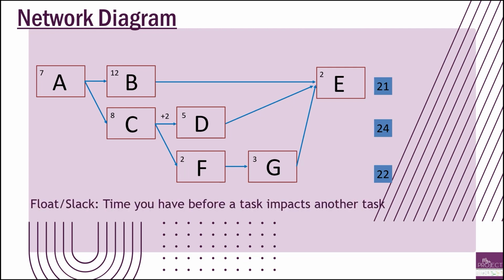This is also a calculation that you will do. And the float or slack means that that's the time you have before a task impacts another task. Now, there's also total slack and free slack, and we'll get into that. But right now, just the word slack and float means it's the time you have before it impacts another task. So we're going to calculate that float.